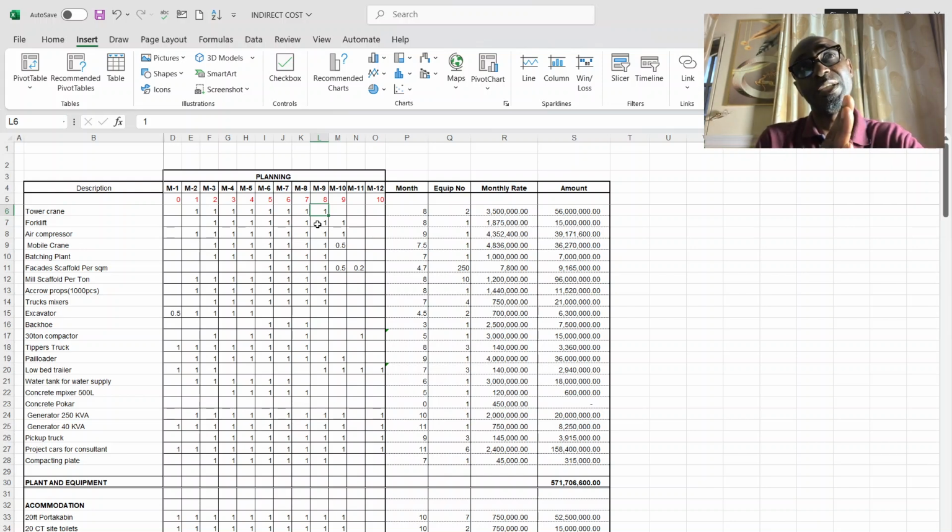But if you have attained your 9 months and you have finished your concrete work and the client is asking you to keep the crane because they've not been able to receive those equipment, the tendency is you're going to ask for payment for keeping the crane beyond that. Or you demobilize your crane and they find a way to take it up, and you don't get the money, you're not being paid for attending to them on that aspect.